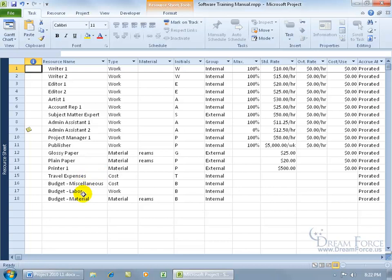We need to learn how to assign our budget resources and enter in the values — how much we want to set aside for the cost, material, and work resources. For the budget cost, it's going to be in currency; for the budget work, in hours; for the budget material, in units.